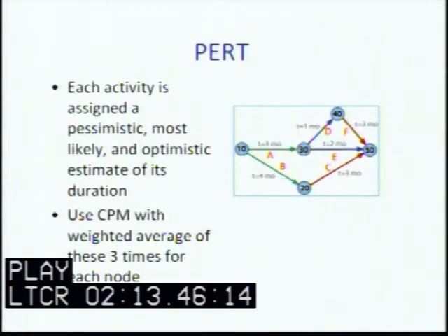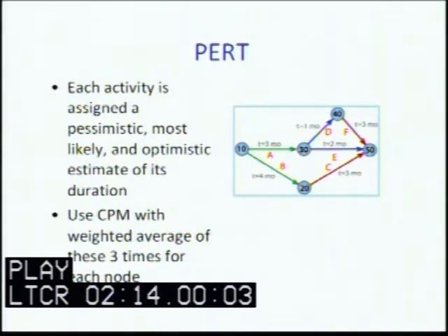The PERT chart, another graphic tool, reflects each activity assigned on a project, either as pessimistic, most likely, or optimistic during its duration. We use this in combination with CPM to identify risks that we have in a project. And notice the combination of pessimistic, likely, and optimistic estimates will give us a better sense of the reality of a project and what deviations we might have of the duration. It helps us assign probabilities for each of these risks and to deal with them appropriately.